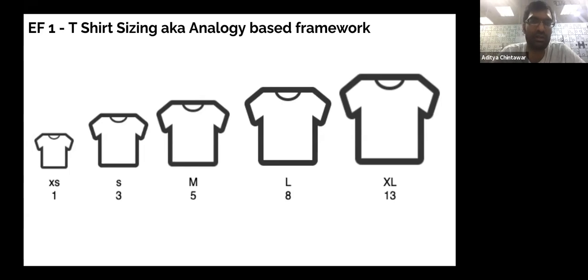That would be more of a guideline to all of you as to how you choose these frameworks. But this is something which I personally always use wherever I go the first time. This helps to truly understand how people think and get everybody on the same page, because it's really simple to say that a medium sized t-shirt usually takes, let's say, half a sprint to deliver. That's 5 business days. We can ship this product out, and you start that as a core principle, and then you build on large, extra large, small and extra small. That's how you start prioritizing each of the features.